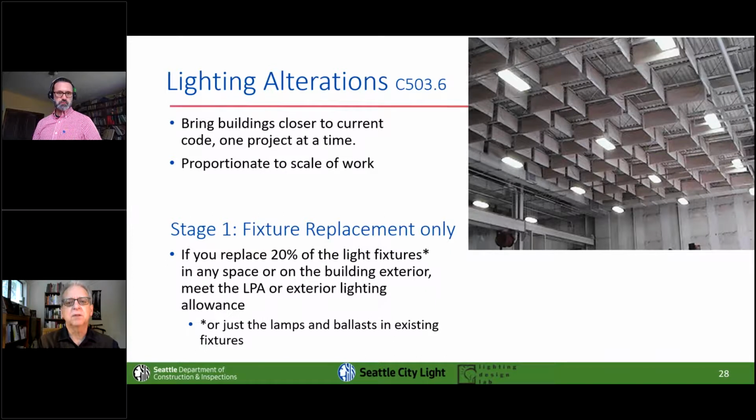Keeping yourself out of trouble. The big delay when people are going in for permits is correction cycles. It's not the original review. If you come in with a set of documents that is really tight and have extremely few corrections, your client's going to love you.